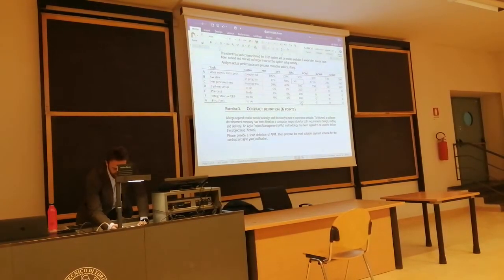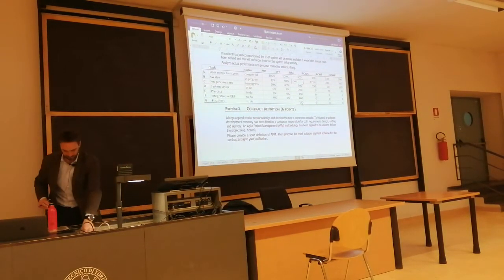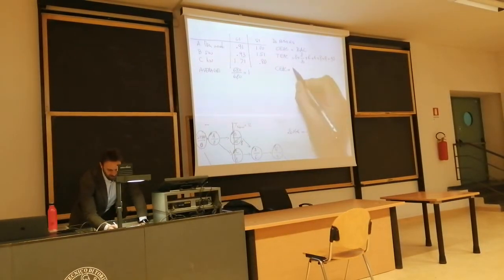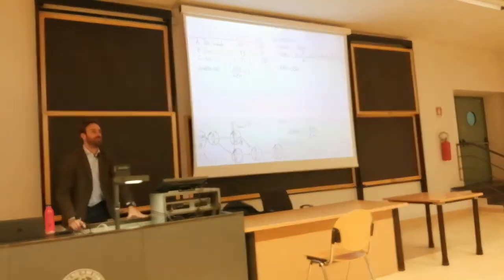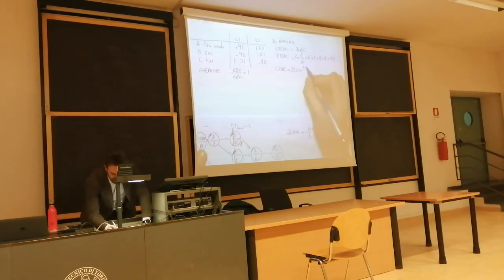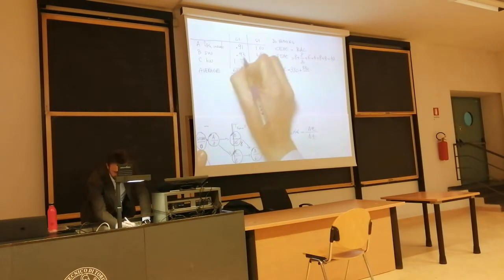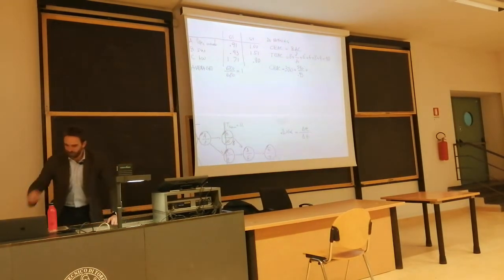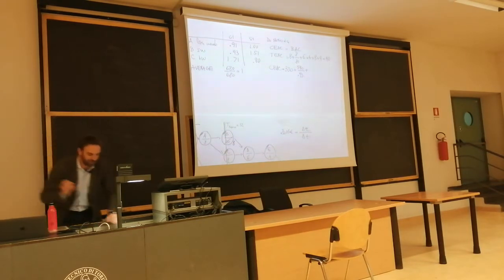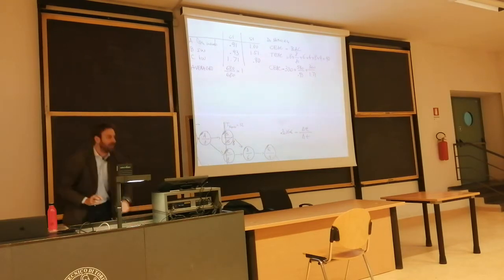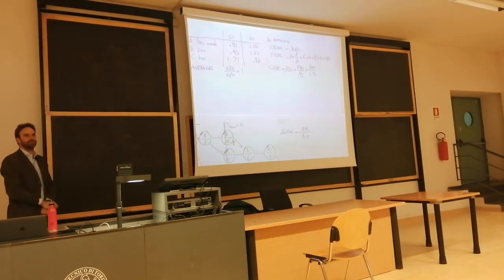So CEAC would equal $330 on task A plus. What about B? B original budget was 540 over 0.93, plus the budgeted cost of the hardware procurement, 300, with major savings of 1.71 on the cost index, right?